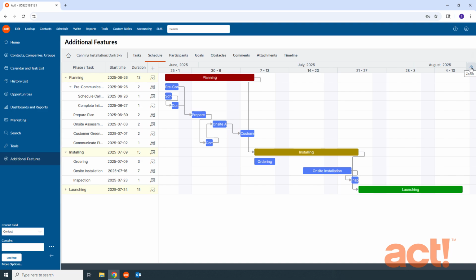On this Gantt chart, you can also use the Add Subtask button to create any new tasks directly from this view. You can also drag the left side or right side of any phase or task to change its projected start or end times. Create relations between two tasks by clicking and drawing an arrow tool from the end of one task to the start of another.